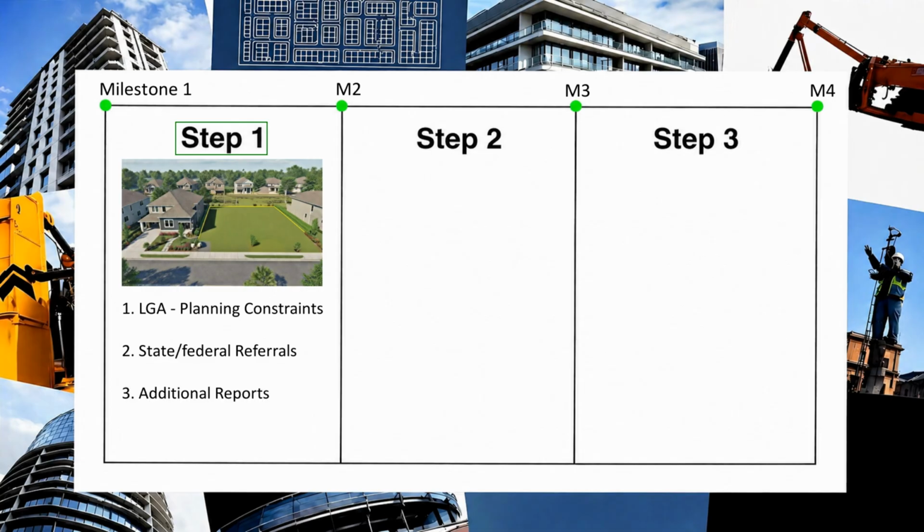Undertake any necessary additional reports such as bushfire hazard assessments, stormwater management plans, traffic impact assessments, ecological residual impact assessments, any biodiversity offsetting requirements, and/or hydro modelling if necessary. And complete a DA Form 1 for a material change of use development application seeking approval for a multiple dwelling.